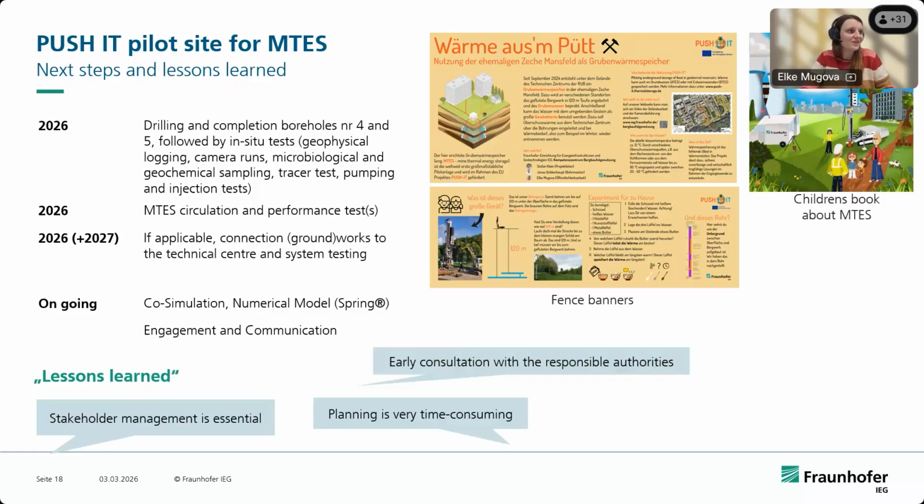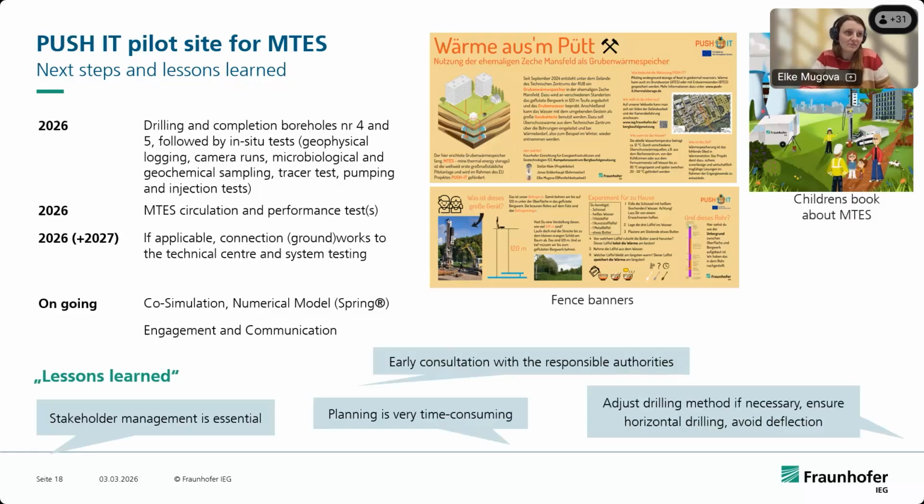And as I said here, early consultation with responsible authorities is important because you're sent from there to there to there to there and then back to them. So yeah, early consultation. We adjusted the drilling method and we made sure that we avoided deflection of the drilling.